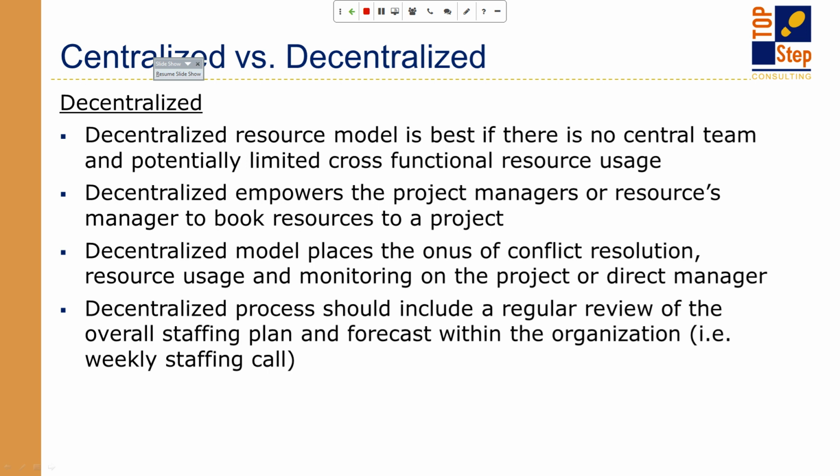So you might run into sort of a resource tug-of-war where you have different project managers trying to get their hands on the same resource. I'm a former resource manager, so even in a centralized environment, we run into that quite often. So if you're not careful to track and share your overall resource utilization needs via accurate forecasting and reporting, you can run into some conflicts with this type of model.